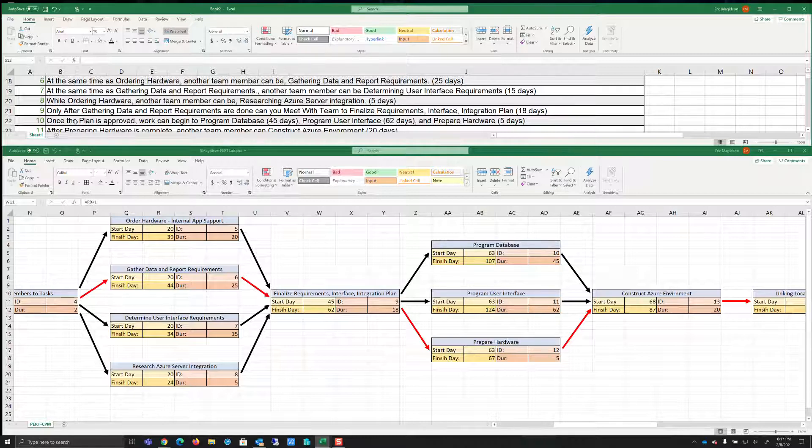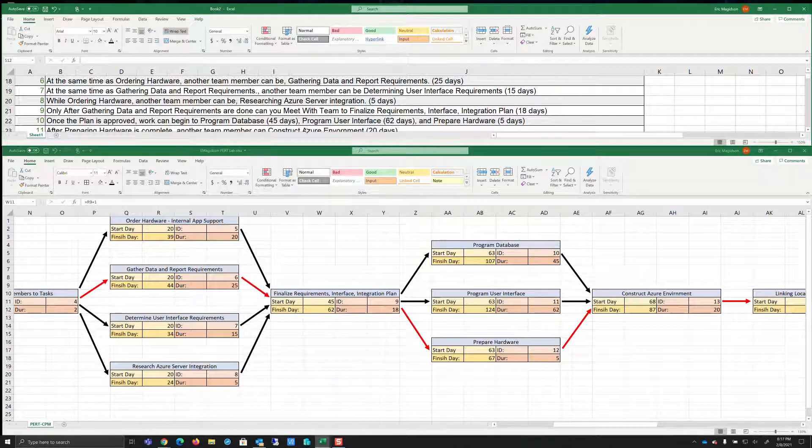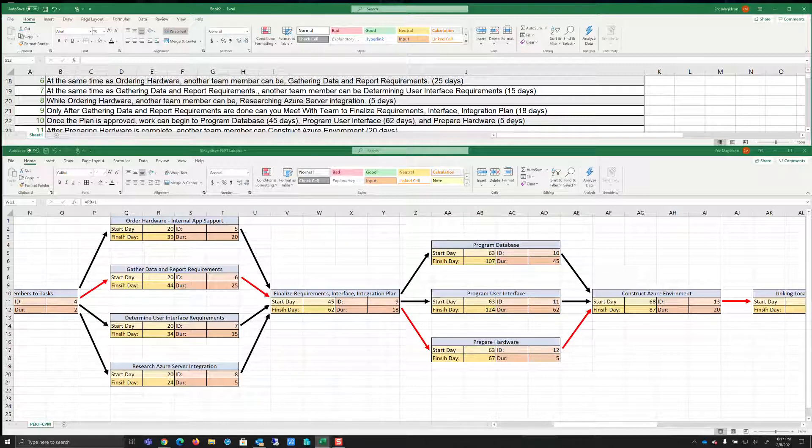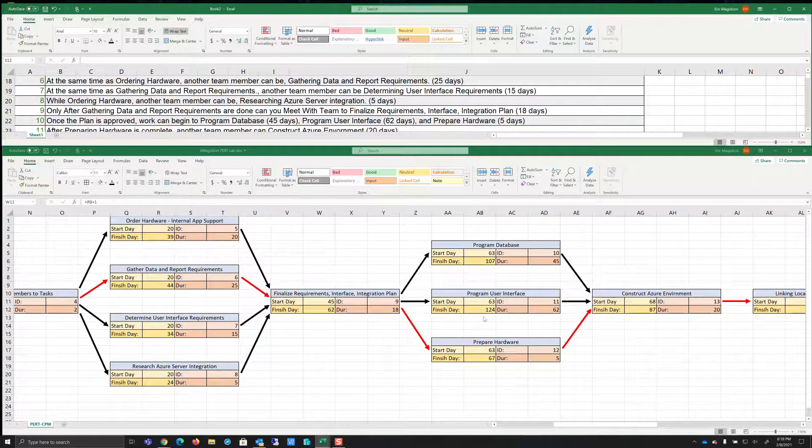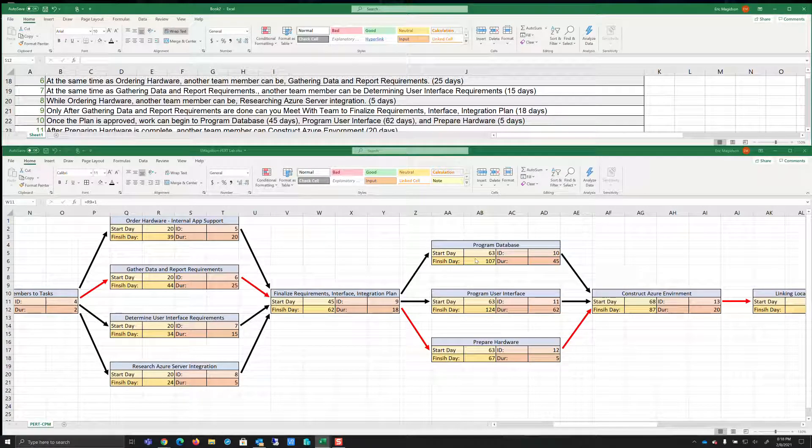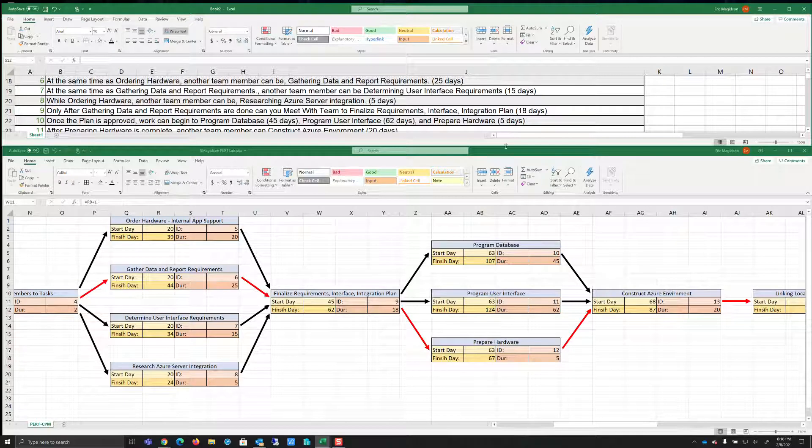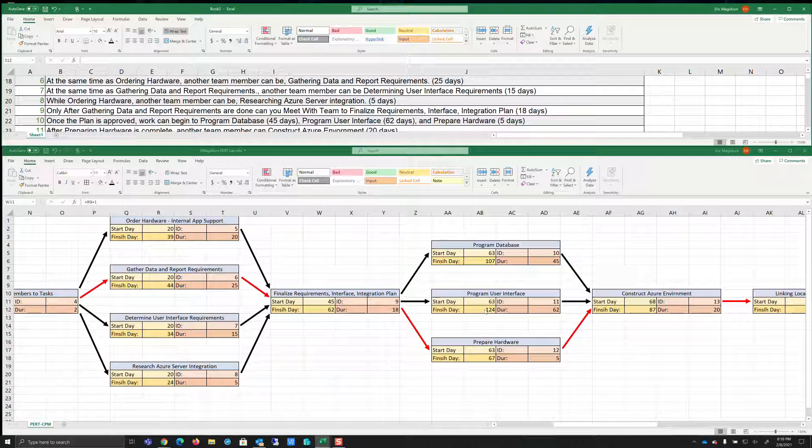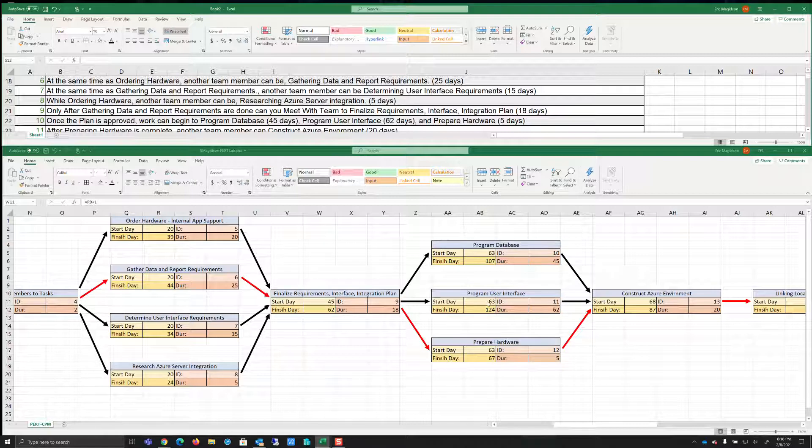It says once the plan is approved, work can begin to program database. Now notice now I've got different days, 45 days, program user interface, 62 days, and prepare hardware, five days. So I've put those all as individual tasks. And as I assess that, I see that my longest duration through these tasks is in fact the 62 days it takes to program the interface. Thus, I can't start anything else until the 124th day, right? And then we move on from there.